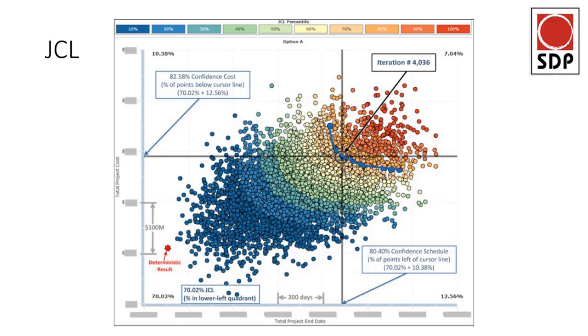In some cases, you need to go down to a level 3. And if there's a specific risk that affects a specific discipline or a specific aspect of the project, you might even go down to a level 4 for that particular area, not for the entire thing. Because my job is to look at the effect of uncertainty on objectives. And in this instance, these are one-trick pony kinds of apps. @Risk can model any decision.